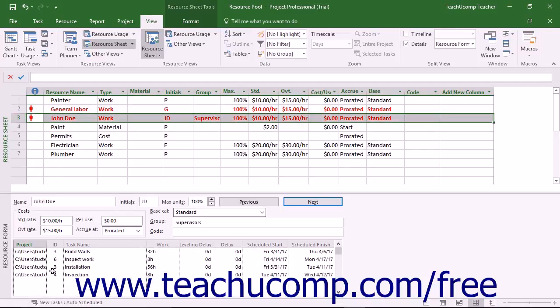You can then use this information to correct resource allocation issues that can arise. In addition to managing resource allocations, you can also change working schedules or pay rates for any resources in the resource pool to make a universal change to all the sharer project files.